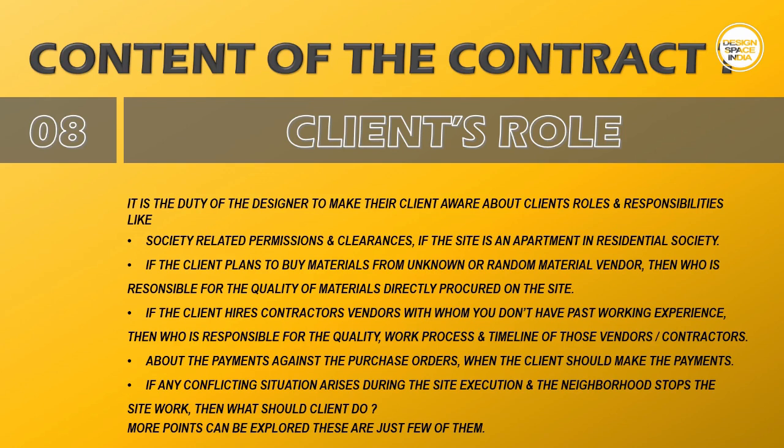4. Any conflicting situation that arises during the site execution by external factors, such as the neighborhood, that results in stopping the site execution, the client has to resolve the same. More points can be explored, as these are just a few amongst the frequent challenges the designer faces.